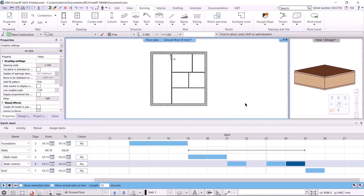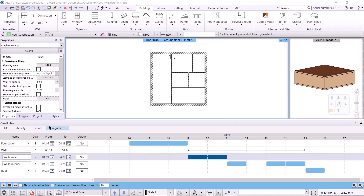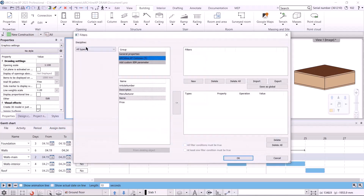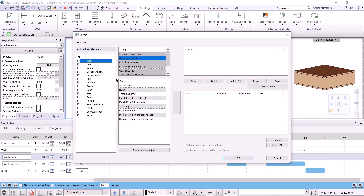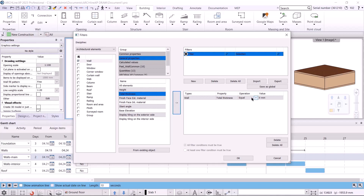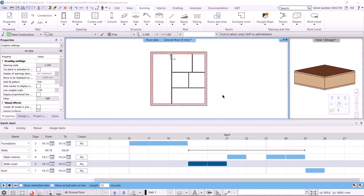Let's see how to assign elements. We can do this in two ways: with a filter or by selecting the elements. First, let's see how to use the filter. I will assign the 38-wide walls to the main walls. I select the specific period, and under the command assign items, I choose to add a filter. I have to select the discipline, which will be architectural elements, and then the wall within that. Based on the total thickness, I will specify which walls the program should assign to the activity. So I select the total thickness and drag it over with the arrow. The operation is to set the total thickness equal to 380 mm. I accept with OK, and we can see that the program marks in red the walls that have been assigned to the specific period.